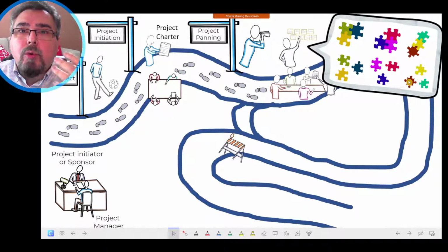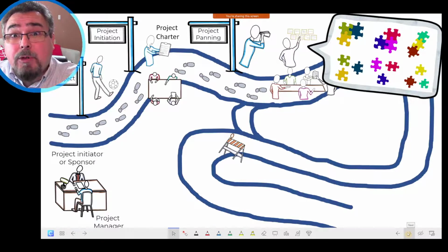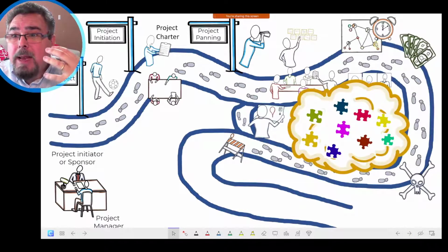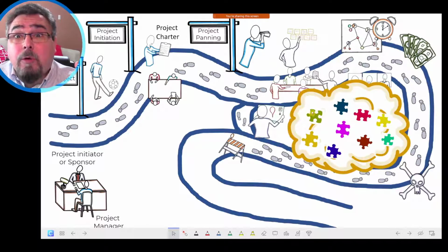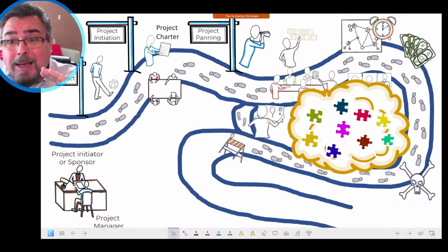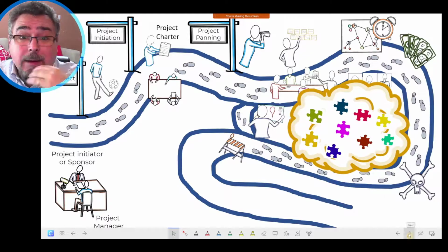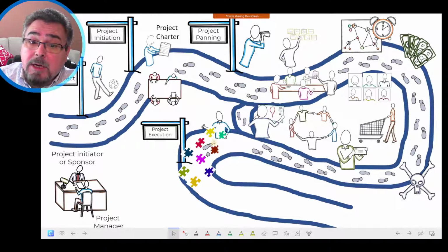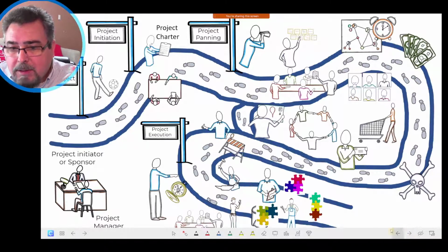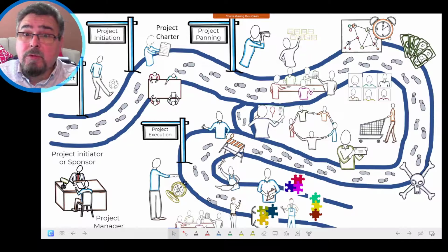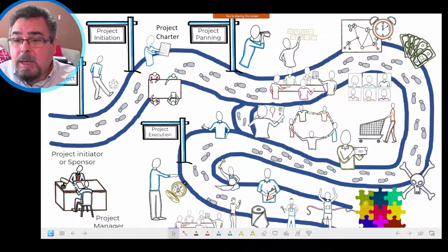So what we do when we use a linear project management approach is plan the scheduling, the human resources, the budgeting, the risk, procurement, and communication. We do the planning for all the work packages, for all the activities at once. We get a project plan to execute all the activities. And then what happens when the project plan is approved? We start working on each work package, doing the execution, on all the work packages identified before. Then we start getting the subdeliverables, the deliverables, and then we get the project done.